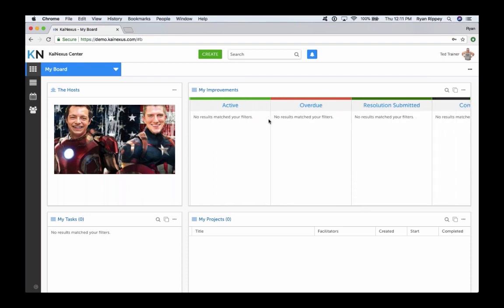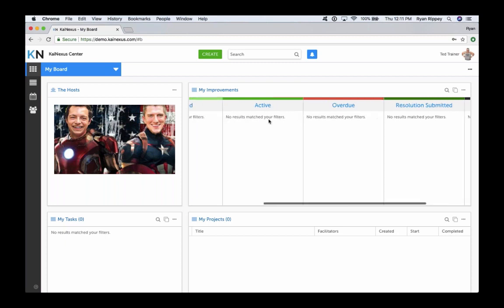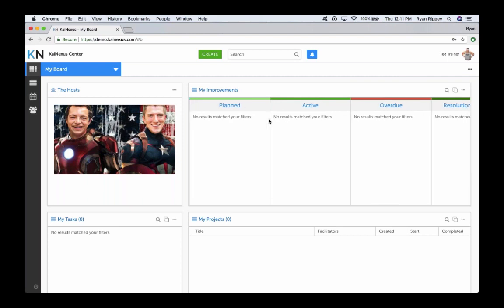Well, Ryan, if I put it in plan, do I have to give it a start date, or can I just say plan and start it at a different time? That's a great question, Banna. So anytime you're planning an item in KaiNexus, if you have an exact start date in mind, you can include that. If you want to decide later, you can leave that in a plan status and be able to come back in and update that when necessary. You can also plan items based off of the completion of other items in the system. So I can make it dependent on something else that has to be finished first? I like the word you use there. Yes, dependent. That's actually our dependencies feature that we have available in KaiNexus. So a lot of different things we can do with those planned items.